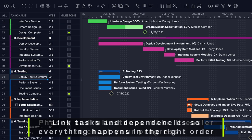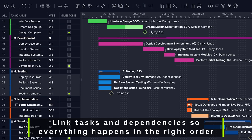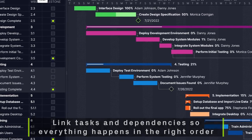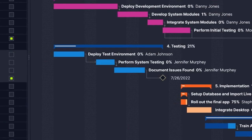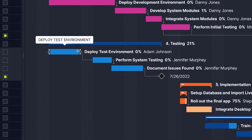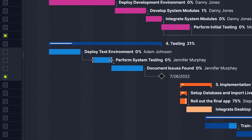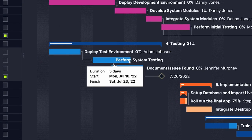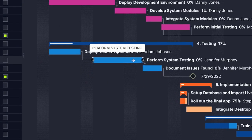Link tasks by their dependencies so that everything in your project happens in the right order. Once tasks are linked, any date changes to one task will automatically adjust the rest of the plan in the Gantt chart.